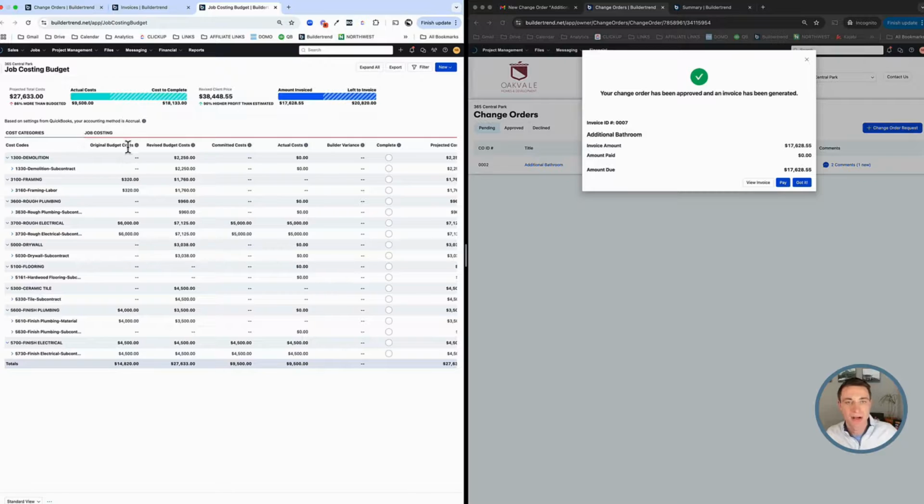It's not like we just have that original, and it gets thrown out the window because we added that bathroom and those other aspects. That makes the budget completely useless. What are we even doing with it, right? The revised budget accounts for an approved change in scope of work.